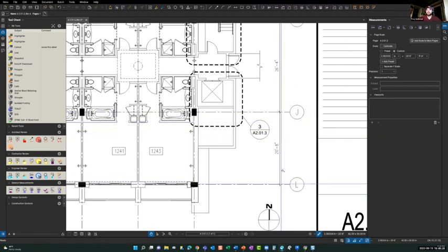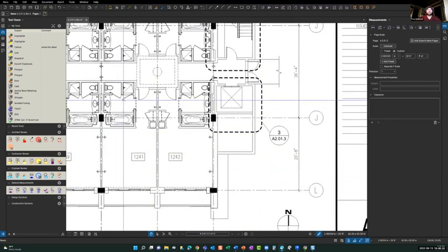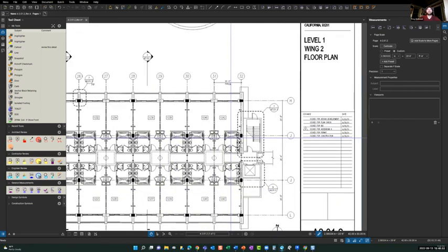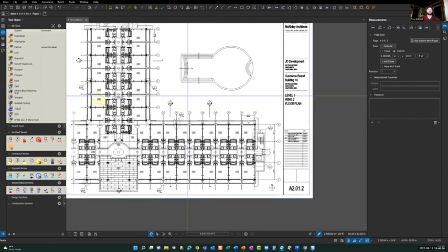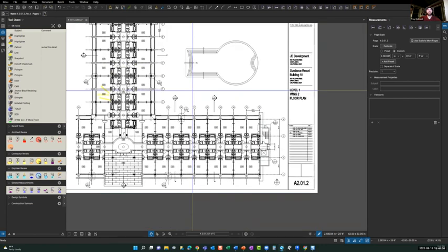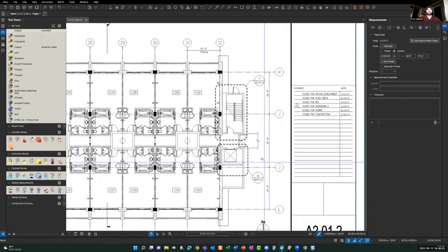I kind of consider these to be larger than others. I do hear a lot of instructors telling people to use a door. I cringe every time I hear that because we don't know if it's a 3-foot door like they're telling it is. And it's also a very small distance to be able to try to calibrate the whole sheet off of that supposed 3 feet. So yeah, good point. Use the bigger dimensions if you can. This one, yeah, that's one of the bigger dimensions on the sheet. So that definitely works.